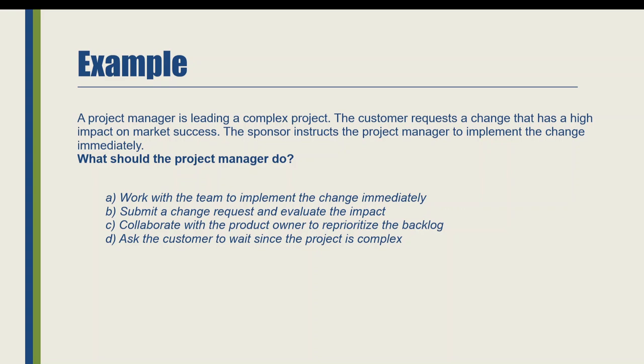So among all the options, B seems to be a reasonable answer, which is submit a change request and evaluate the impact. Yes, this also goes well with the process of change request, like submitting a change request first and evaluating the impact.